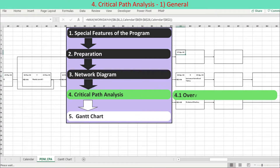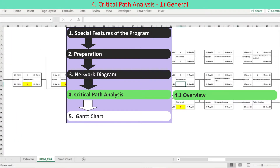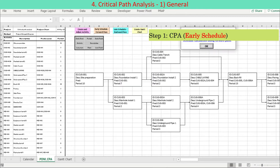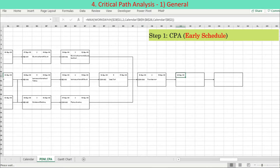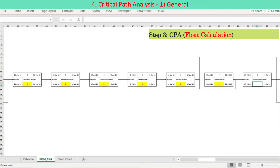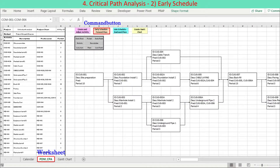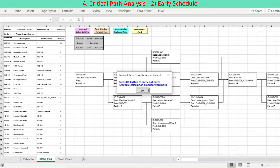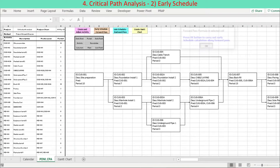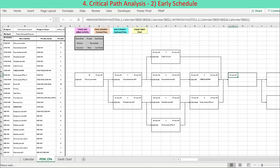Now we are ready to develop the logical schedule referring to the network diagram you finalized earlier. The schedule becomes logical through critical path analysis, which is composed of three steps: Step 1, early schedule calculation along the forward pass; Step 2, late schedule calculation along the backward pass; Step 3, float calculation by comparing early schedule and late schedule. Early schedule is derived by pressing the second left button at the top of the worksheet named PDMCPA. A user form appears to help display the formula inside the formula bar. Press the OK button on the user form. The activity node is converted to a three rows by three columns data range to contain schedule data.